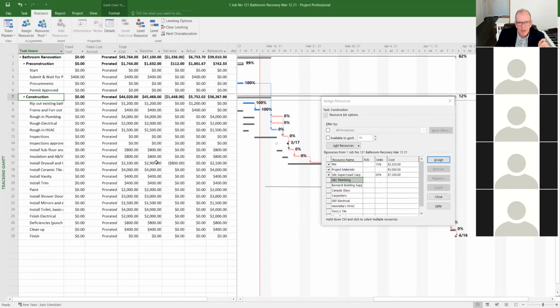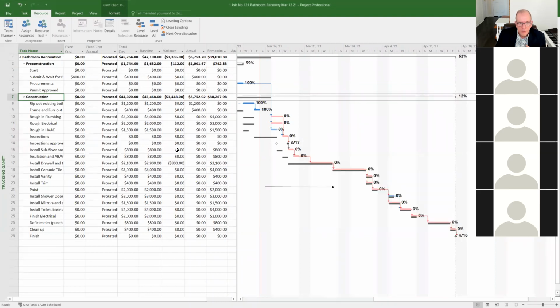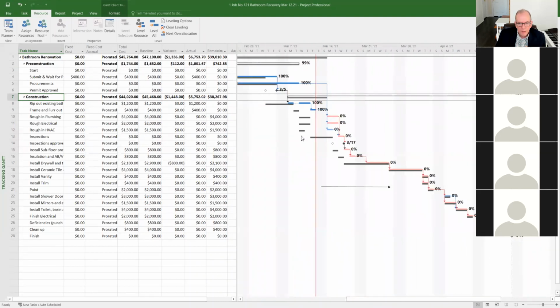So again, there's certain per diem costs where we can make really good savings, or we can lose lots of money by taking longer if we've got a lot of people there on the site for an extra day. So that is helping us dramatically improve our budget. We are ahead of budget now with this new plan. And that's the other thing I'm saying: the original plan, it was okay to have the original plan the way we did.